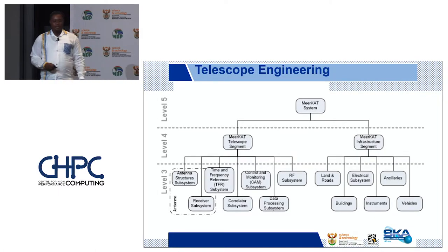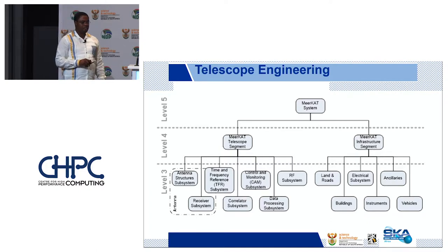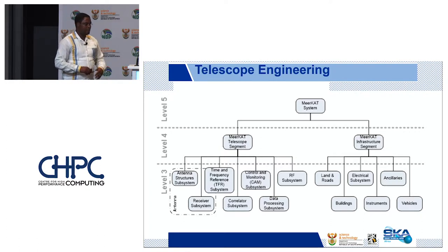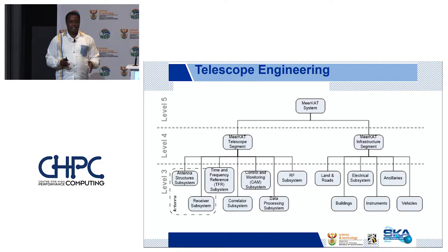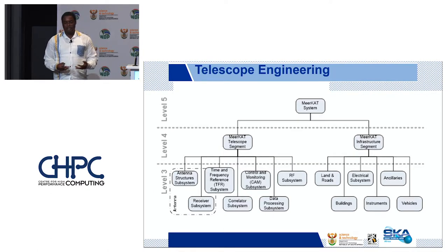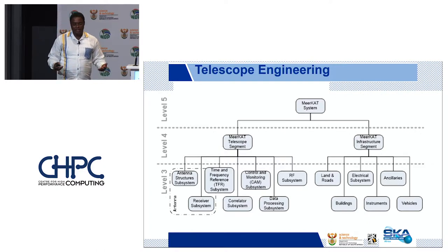As an engineering project, it breaks down into several components. At the top, level five is the MeerKAT system. We've got two major groups. One is the MeerKAT Infrastructure Segment — these guys are responsible for the site: making sure we have a site, we can get to the site, when we put things on the site the lights will actually come on, and it won't get stolen.